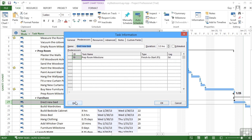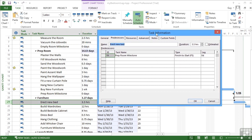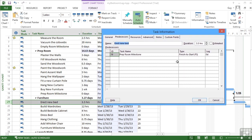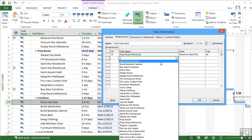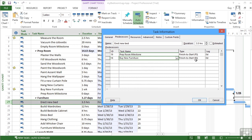So in the erect new bed, I already have a link to the previous milestone. So that's the previous section. Well, now I need to add in a link to the buy new furniture. It's a finish to start. I need to buy the furniture before I can put the bed up. But then there is a lag to allow for the bed to arrive. And that's four weeks.